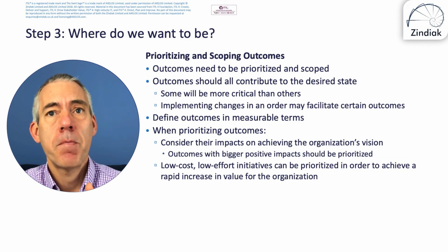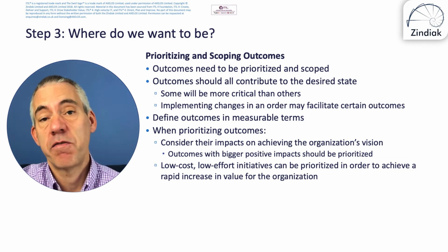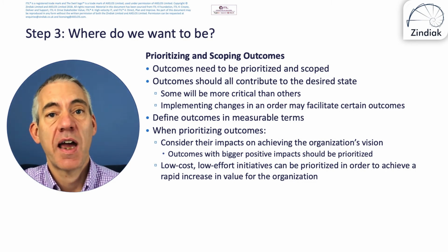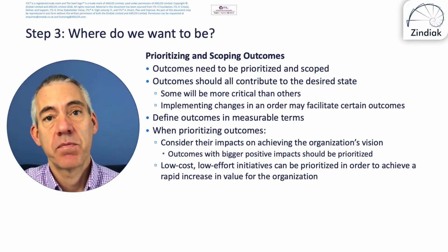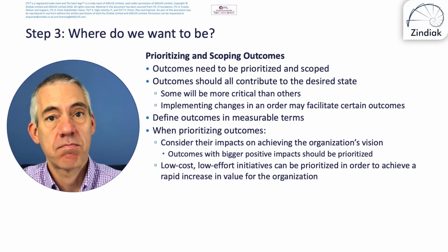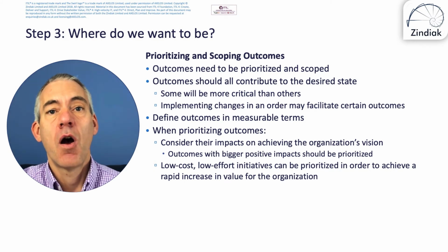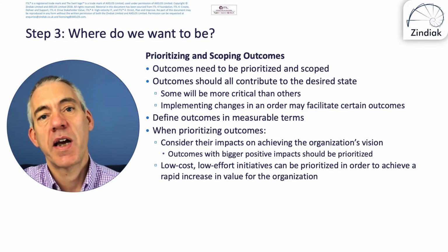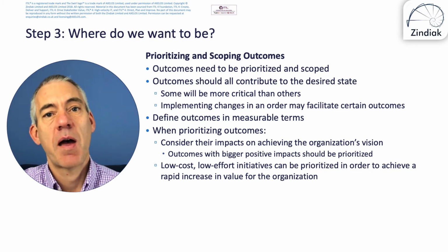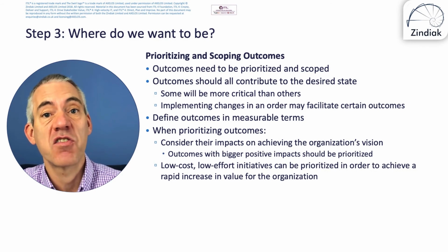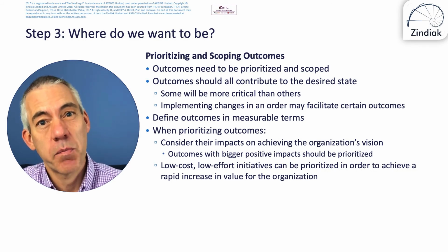Equally, there may be something in January, in the first iteration, in the first sprint, where we say this is the should-have in January. So we're delivering an improvement in this area. It should contain this. But if when we get to the end of January, the end of the step, we haven't delivered it, it might become a won't-have for now, i.e. we're not going to deliver it this year, which is why it should be delivered in January, because this is our only chance to deliver this particular improvement.